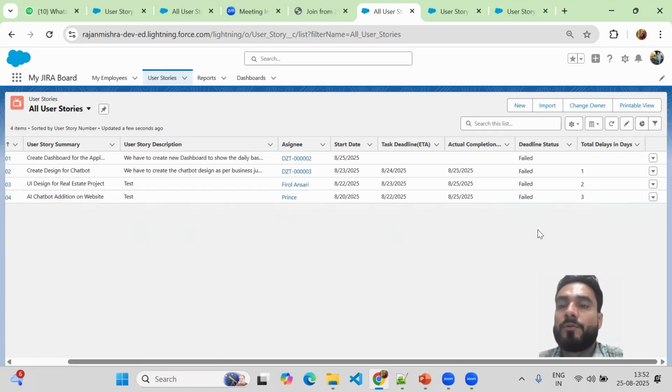If you want to advance the formula and also bypass Sunday, right? Because Sunday is not a working day, so it should not be calculated. So we can add to that formula to bypass any specific date. You can also bypass any holiday or Sunday, or any other day off. So if you want to bypass those, you can do that.